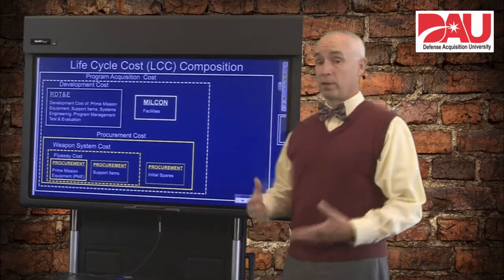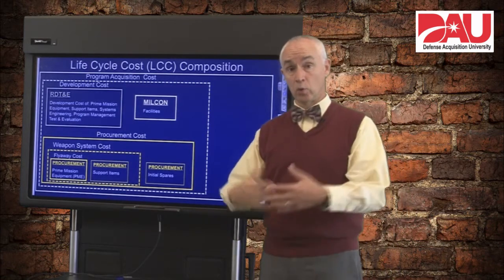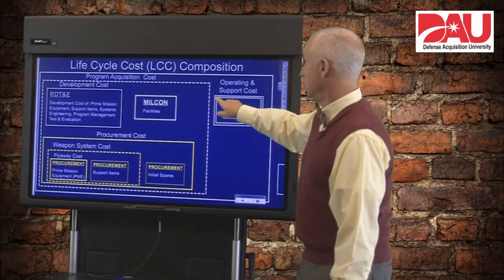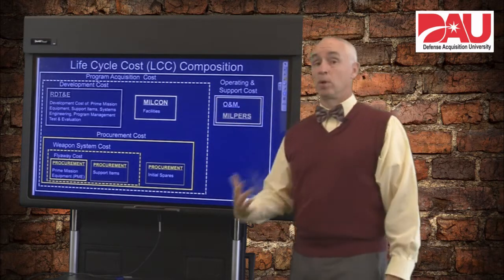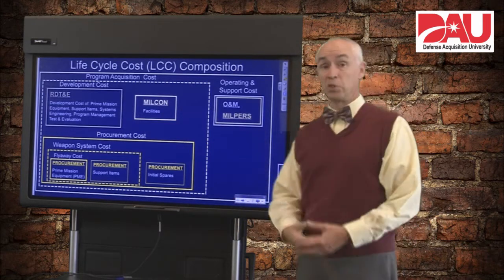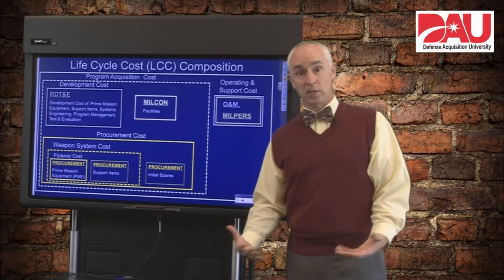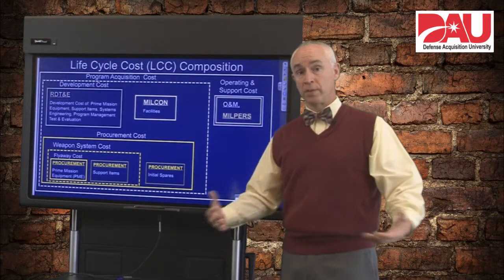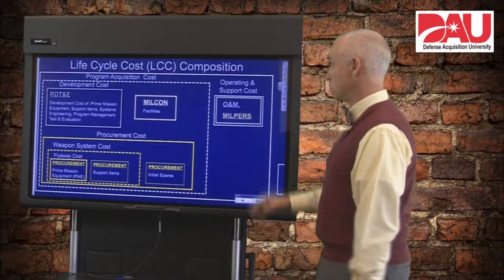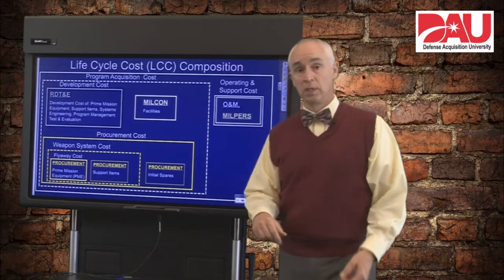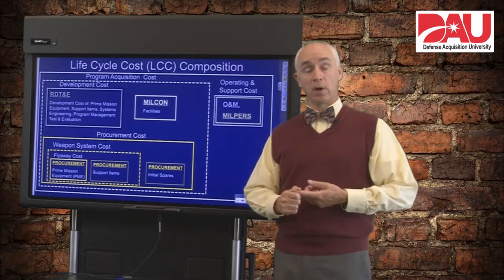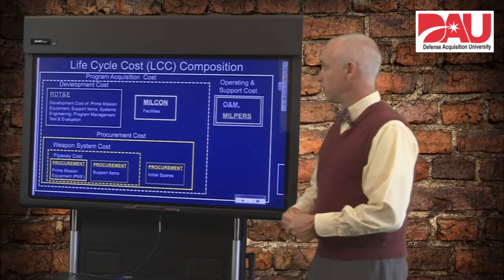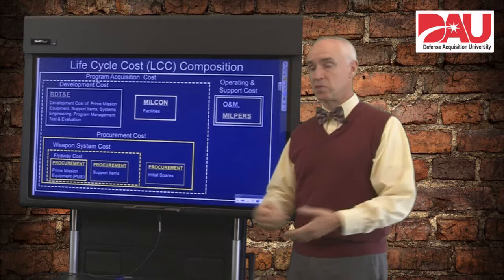We also have a couple of other things that go into the total life cycle cost. First here is operating and support costs, and these tend to be, quite frankly, the majority of the life cycle cost of the system, because we're often operating and supporting a system for 20, 30, or 40 years. So this tends to get very expensive. Those costs include all of your operations and maintenance costs — things like parts, fuel, and running and maintaining the system.